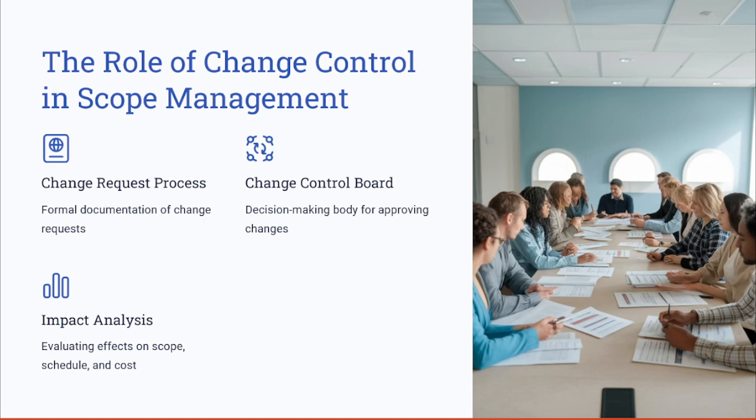The role of change control in scope management. So the change control process and group, or the CCB, is necessary for approving the changes, implementing these changes, and also assessing these changes. The key components of change control include the change control board, or the CCB, which is the decision-making body for approving or rejecting the changes.